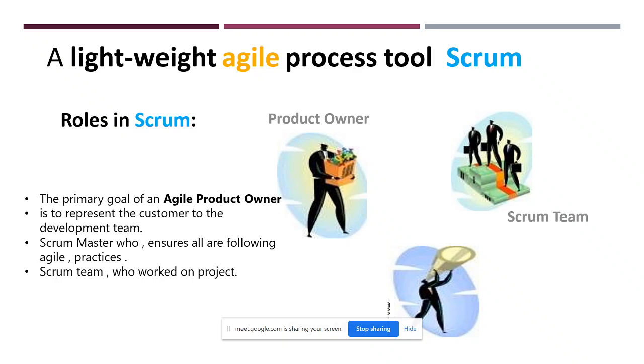The product backlog is an artifact, a place where he gathers every feature. After taking all those requirements, we will design a UI screen, a login module, a cart module, a wish list module, a billing module, and an integration with Paytm or any financial service where we do the transactions. All those requirements will be gathered by the product owner, and he maintains them in the product backlog. The product backlog is a space where the product owner stores those requirements or features. So the product owner has the responsibility to maintain the product backlog.